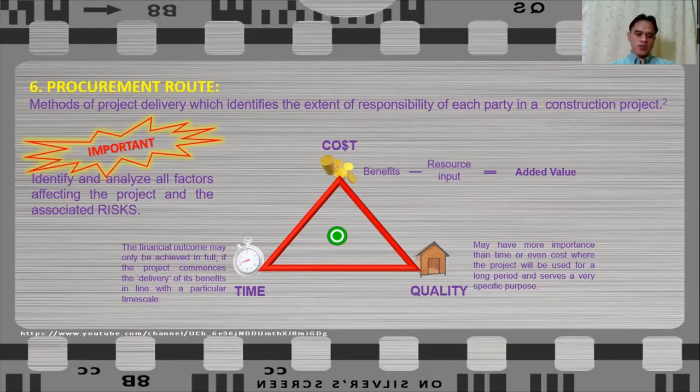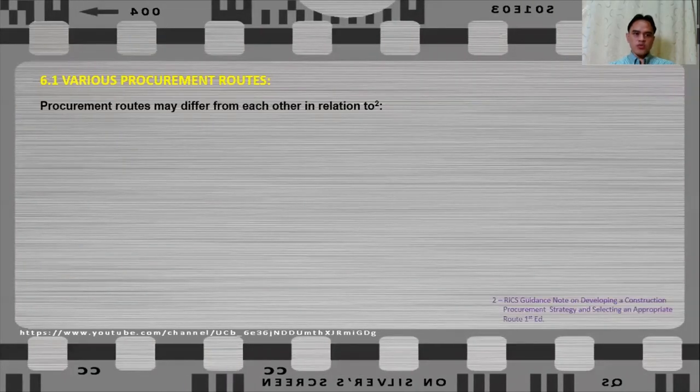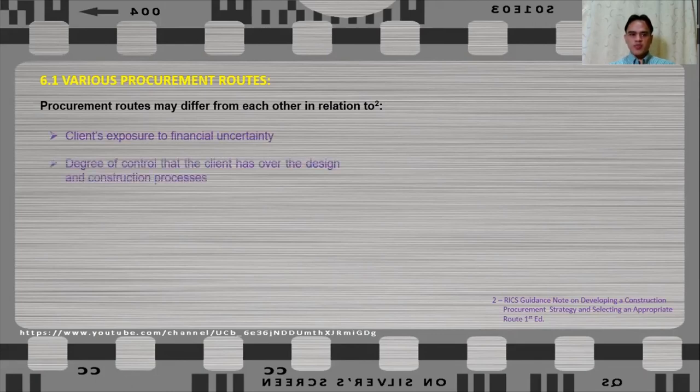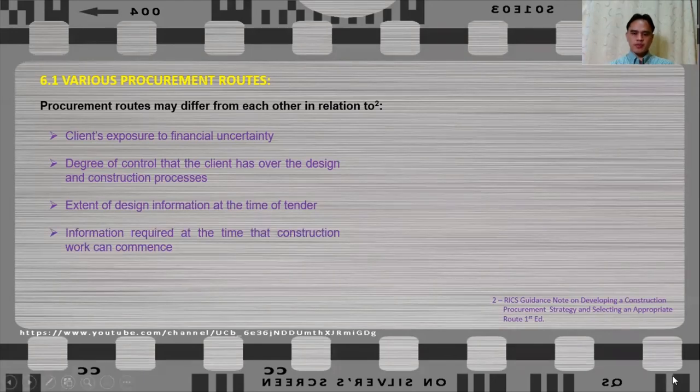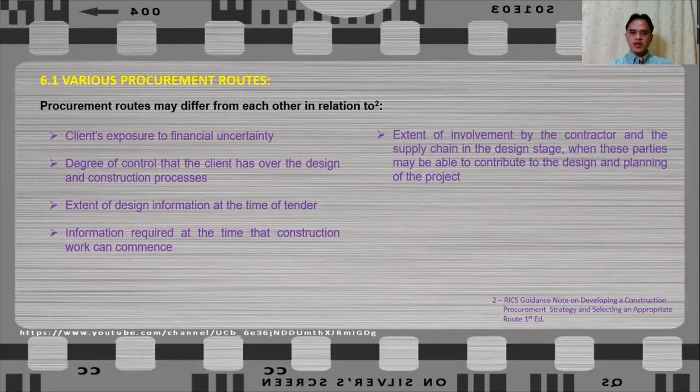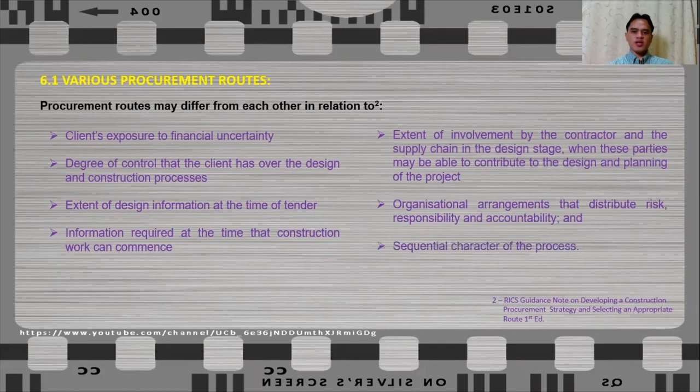Now, there are different procurement routes to choose from and these procurement routes may differ from each other in relation to the client's exposure to financial uncertainty, the degree of control that the client has over the design and construction process, the extent of design information at the time of tender, the information required at the time that the construction work can commence, extent of involvement with the contractor and the supply chain in the design stage, when these parties may be able to contribute to the design and planning of the project, organizational arrangement that distribute risk, responsibility, and accountability, and the sequential character of the process.